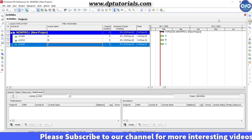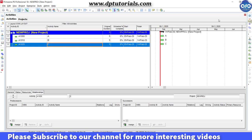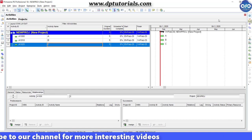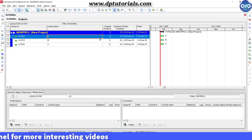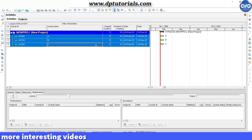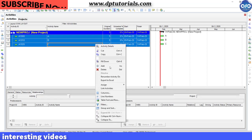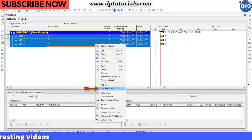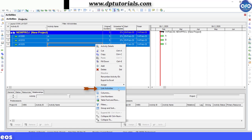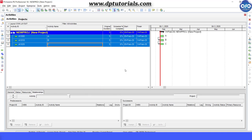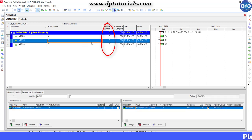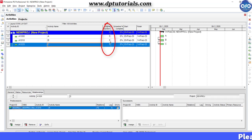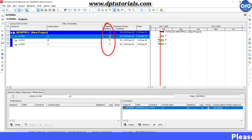So I am taking these three activities in this example and now link all these activities by right clicking and selecting link activities, which gives the finish to start relationship between these activities.